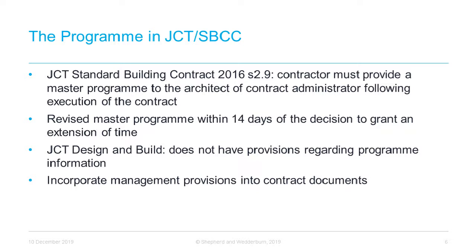Therefore, it may be that parties wish to adopt the procedure outlined in the standard building contract or operate a system with joint access to the contractor's programme. It may be helpful to incorporate provisions on management of the programme into the contract documents, for example, in the employer's requirements, rather than by amending the terms of the conditions, in which case it is important to ensure that the relevant technical parts of the contract documents provide the detail required.